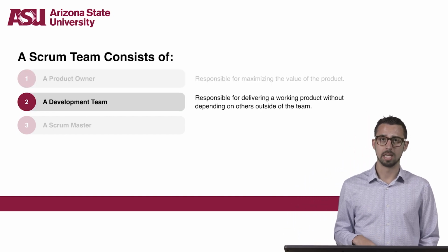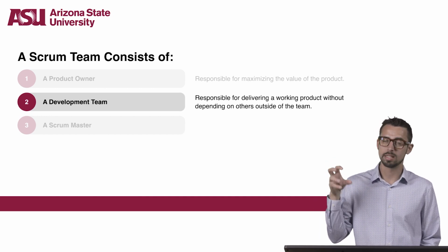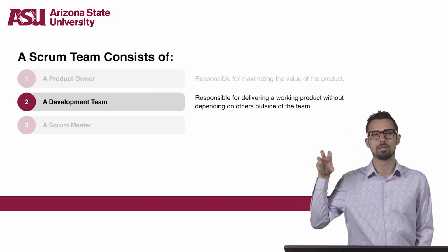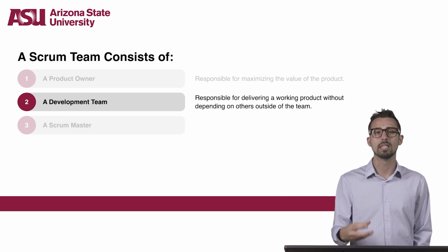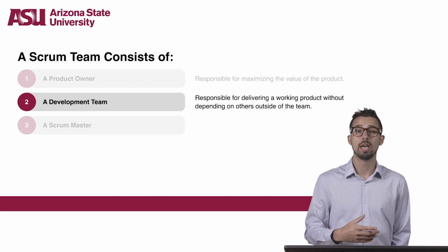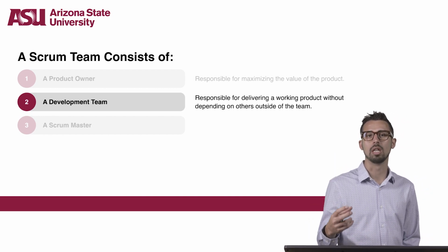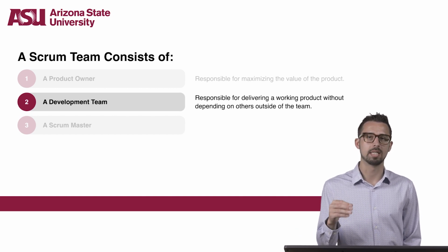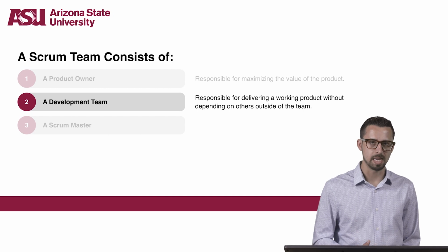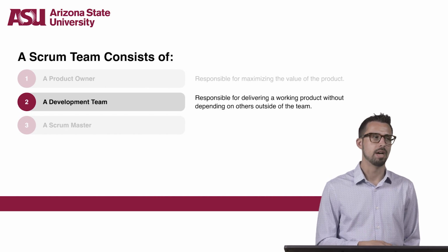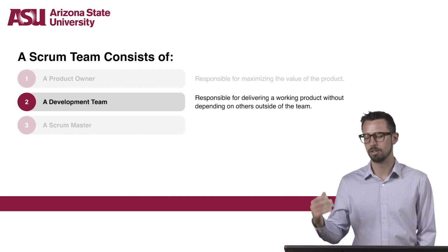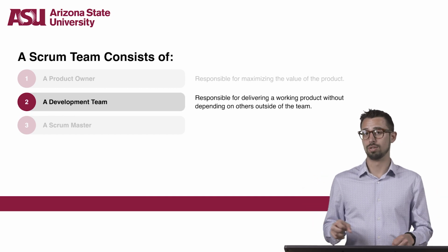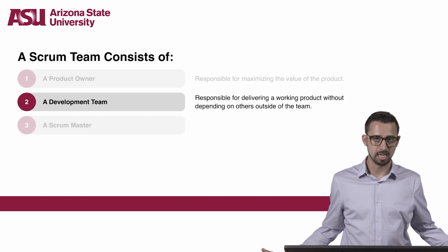The development team is really a cross-functional, self-organizing team. You're going to hear me say that a lot. Self-organizing is really important, but the development team consists of team members who have everything they need within the team to deliver a working product without depending on others outside of the team. So just because this says development team, that does not mean that it is solely comprised of software engineers or web developers. The key phrase there is cross-functional, self-organizing team who has everything they need within the team.